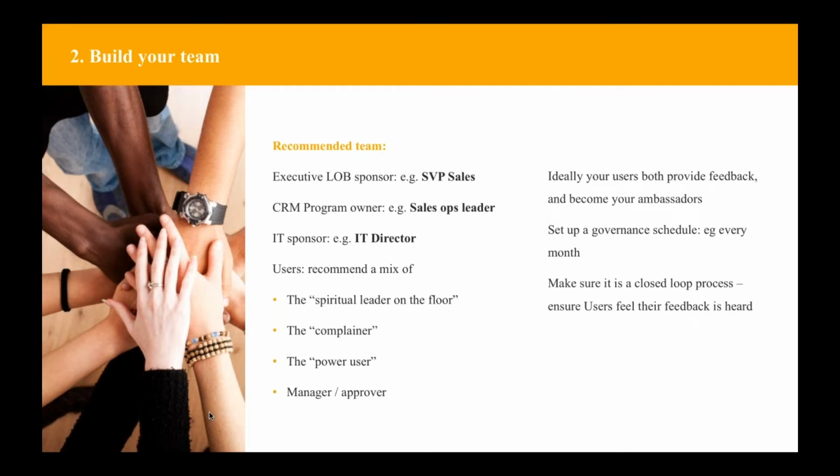as opposed to, then that gets you out of kind of the us versus them, right? And then set up a governance schedule, whether it's every month or every quarter. Our most successful customers gather these stakeholders. They make sure they run the plans by them for phase one as you're starting to plan it, maybe the initial design or use cases, definitely during the testing phase and kind of user acceptance prior to rollout. So you want thorough stakeholder involvement well before and as well as after you do your rollout.